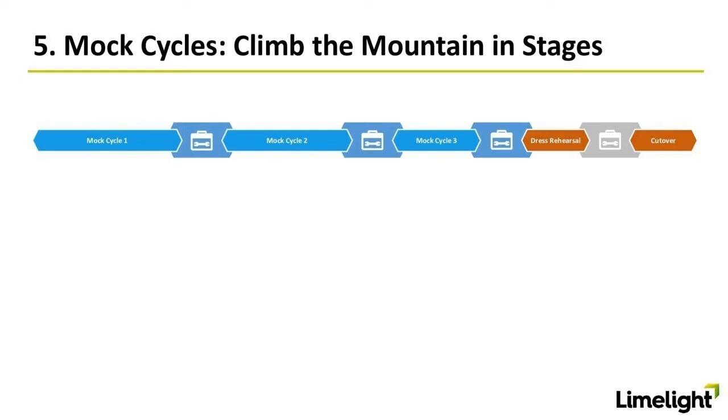So a couple of things maybe to mention about this. You can see on the right hand side that the cutover itself is a narrower window than the test cycles. That's pretty common, and in many ways it's obvious why that might be the case. In early test cycles, you need a bit more time to test things, see how they go. But usually what happens at a cutover window or an implementation window is a very tightly controlled time period. And so these practice sessions, or these practice cycles I should say, are one opportunity to learn everything we possibly can about the data journey. And we see this as climbing the mountain in stages. And I think a lot of programs we've been on have possibly missed opportunity to learn along the way.